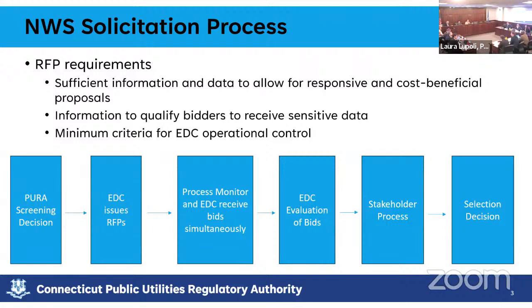And I'm guessing where you're going with this is skipping the queue for the NWA projects. That would be outside of our jurisdiction as the utilities to influence. If, for example, a 5 megawatt storage system goes in, it also has to go through a transmission interconnection study, even if it's connected to the distribution grid. So skipping the distribution queue doesn't actually buy you time.